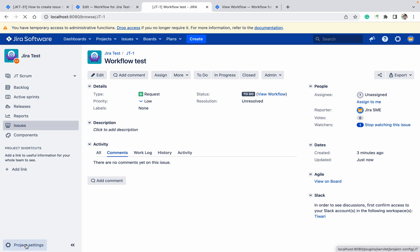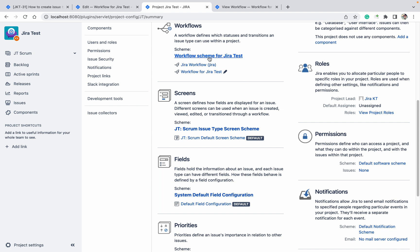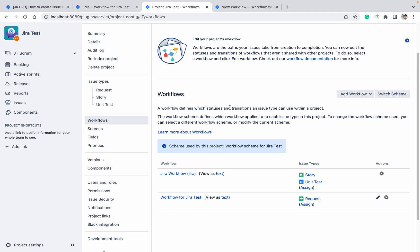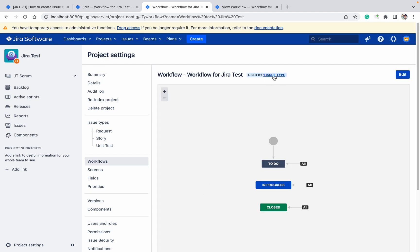In project settings, you can see which workflow is used by which issue type. For example, this workflow is used by Story and Unit Test, while another workflow is used only by Request. When viewing a workflow, you can see how many issue types and projects are using it. If it's used by 10 projects, changing it will affect all 10. So before making changes, create a copy of the workflow and associate it with your specific project to avoid unintended changes everywhere.